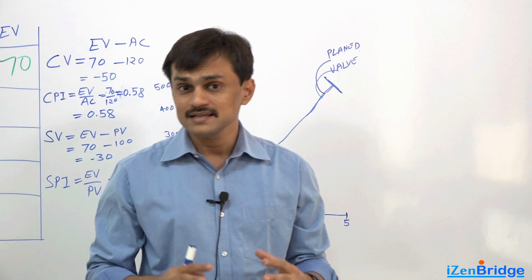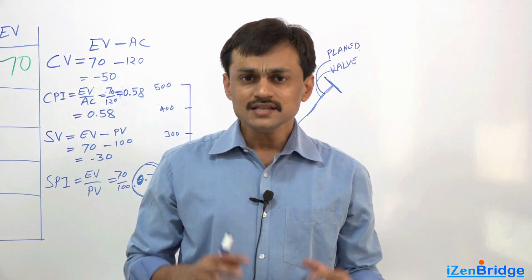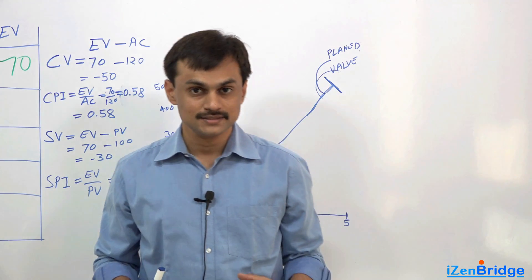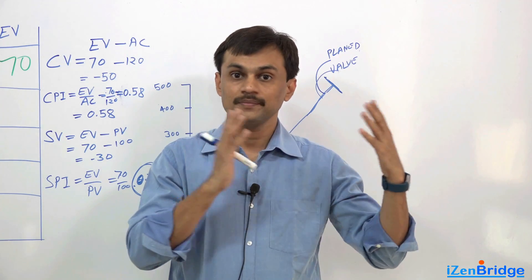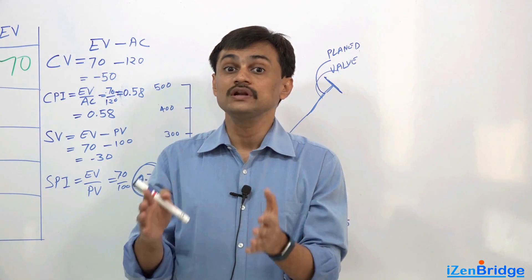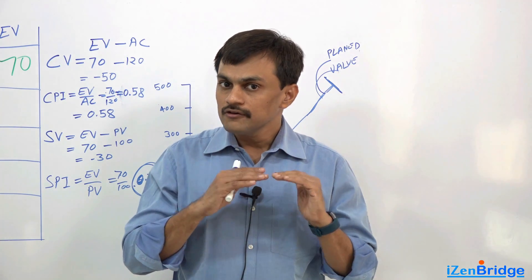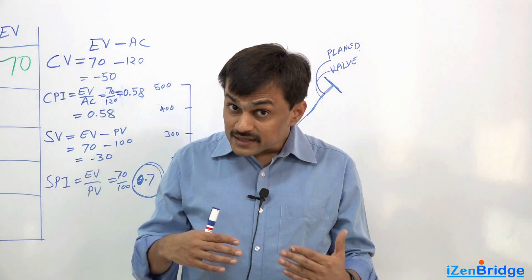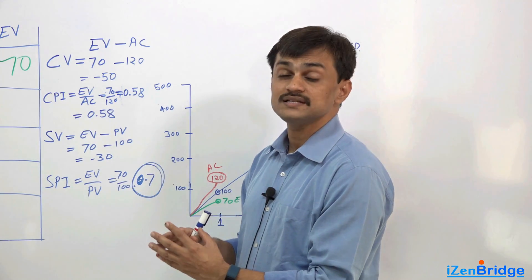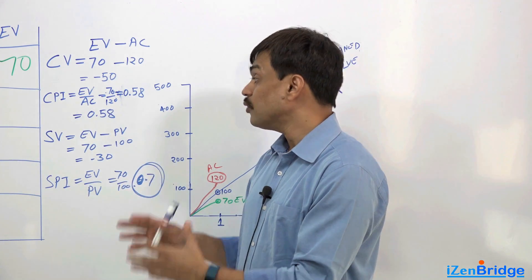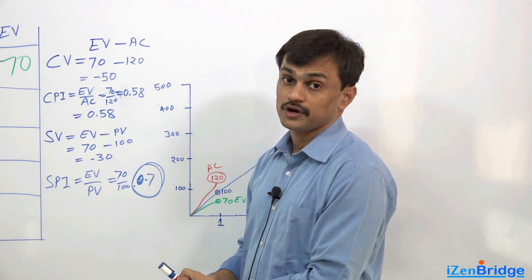Here we are making some forecasts using our earned value calculations. This topic is all about trend analysis. We know this was the planned value, this is the money we spent. We were planning to earn 100, we could only earn 70 and we spent 120 dollars. So this is the story of day 1. We calculated the variances and we understand that we are doing very bad as far as cost performance index is concerned — we only earn 58 cents for every dollar spent because the cost performance index was 0.58.